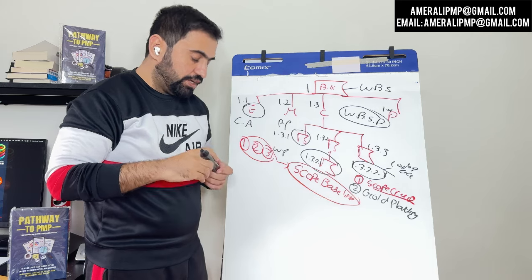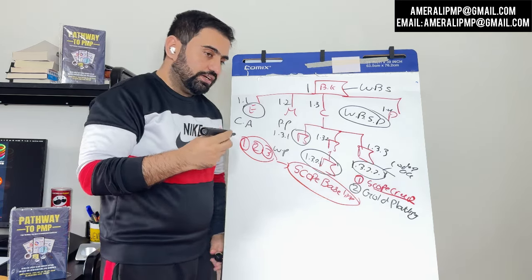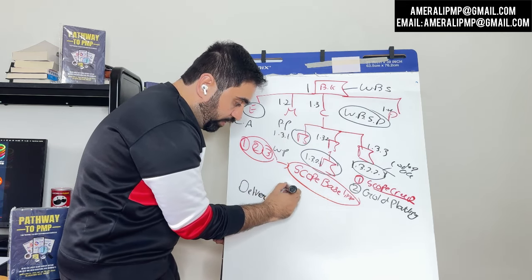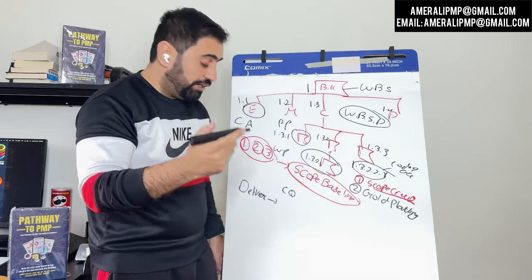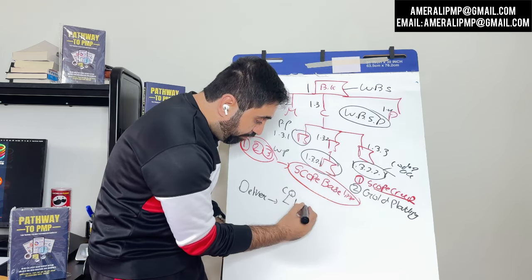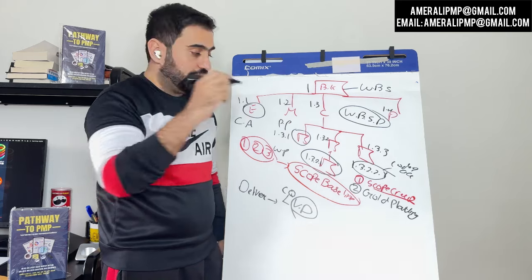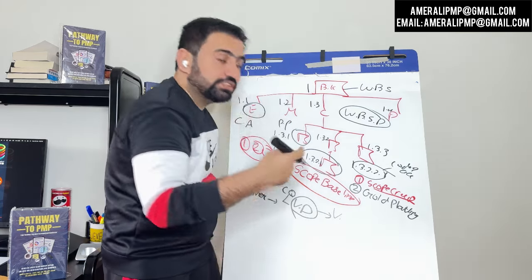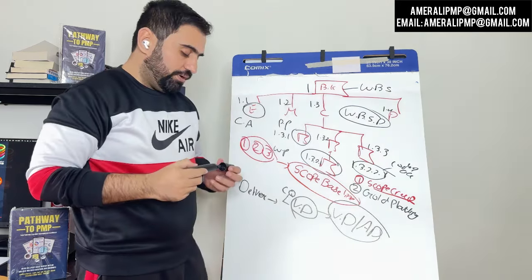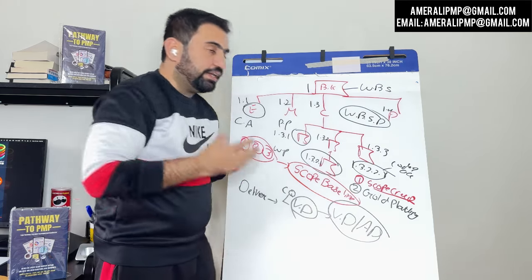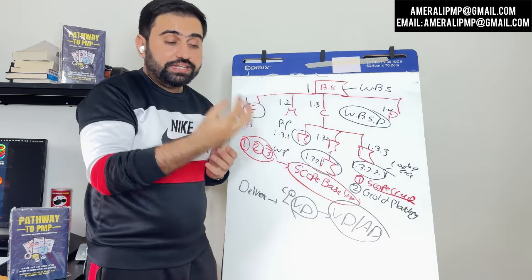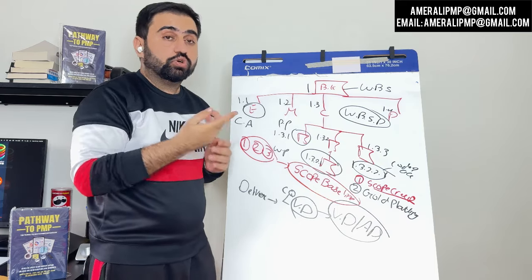As we discussed in quality, when deliverables are made they first go to control quality and are checked according to the quality management plan. If approved by the quality team, they become verified deliverables. Then in the validate scope process, the client checks whether the deliverable is according to the scope baseline — if yes, you get a validated deliverable, also called an accepted deliverable. Remember: the client checks against the scope baseline, and the internal team checks against the quality plan.